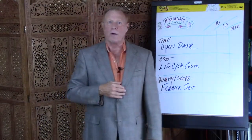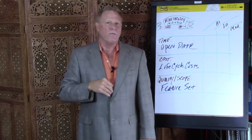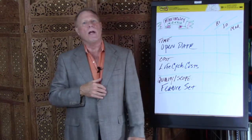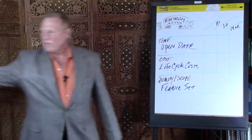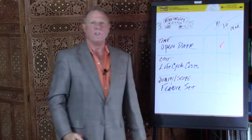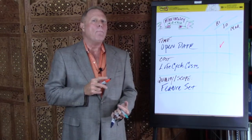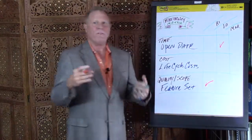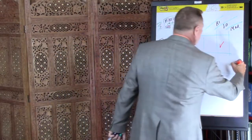Having defined them now in this manner, we set about to find out where we have flexibility. Ask the low-hanging fruit question, which is the one where you think we would drive consensus the fastest. I would, for example, ask: of these three defined in this manner, where do we have the least amount of flexibility? The typical answer, of course, is time, because we can't afford to have people sitting around idle doing nothing. Now, of the remaining two, where do we have the most amount of flexibility? The answer there may be scope — they don't have to have every feature they want on day one. By default, cost has to be somewhere in the middle or moderate.